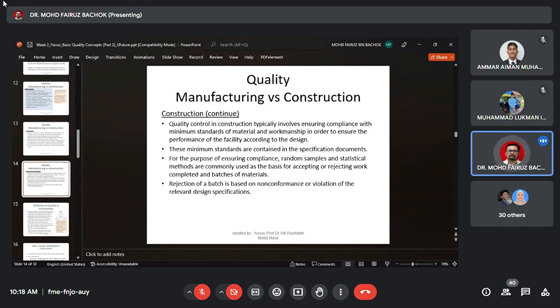Build one foundation, and then take time after it has been constructed. Do a test, and once it shows that the constructed foundation has met the requirement, then you start to build another foundation.